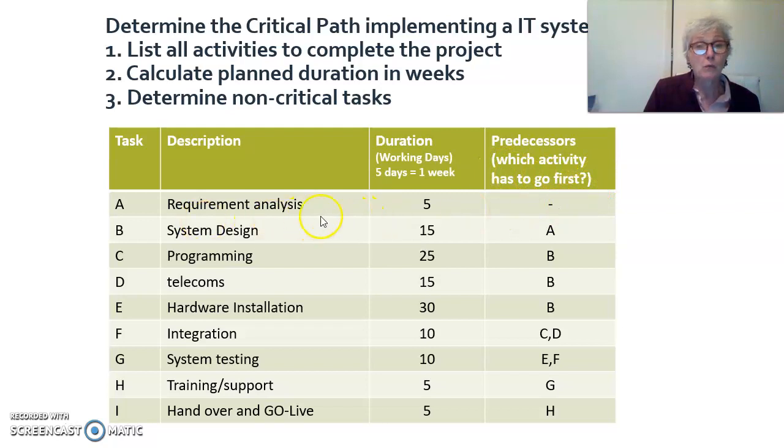So the requirement analysis is the start. But system design needs a requirement analysis. After system analysis, we can start with programming, telecom and hardware installation. These 3 items are a little bit together. And then, when we have programmed, we can integrate and test the system, and then train the workers, and then hand over and go live.